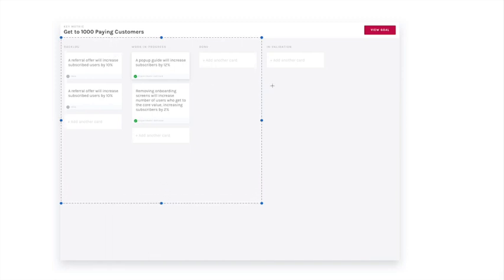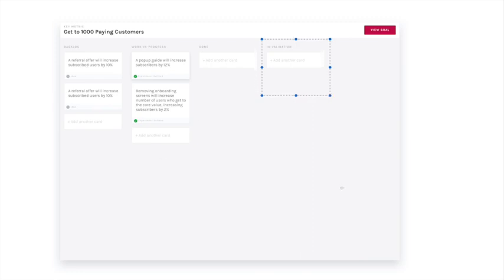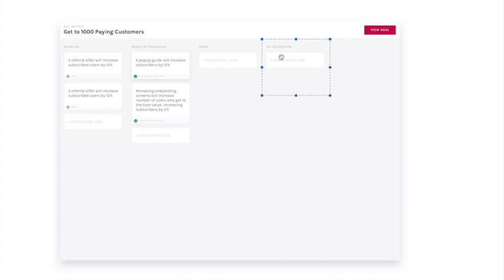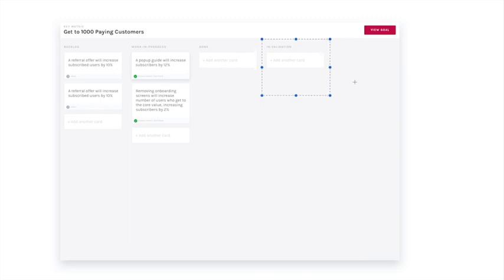So what we can do to change that is to add a fourth column. Essentially, what we're saying is that something is not done until it is validated. What does that mean? That means that rather than simply patting ourselves on the back when the actual coding or development is done, we force ourselves to ask the uncomfortable question of what was the outcome of that work?